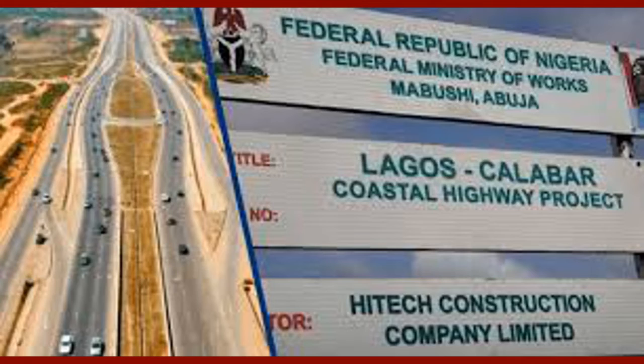The EPC plus F model can be attractive to government because it shifts some of the financial risk to the contractor or the consortium. However, this means that the contractor needs to be careful and assess project risks well, risks such as cost overruns or delays, mainly to ensure that the project remains profitable.